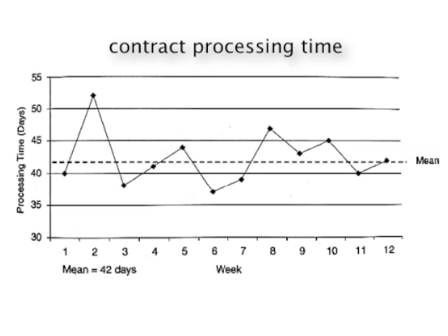Because the average processing time is 42 days, his first thought is that the contracting office should stop accepting new contract actions 42 working days before the end of August. That means around the 1st of July, but that is only the average. Contracts requiring more than 42 days to process would still create extra hours of work in order to be completed, unless an equal number requiring less than 42 days were in the queue.